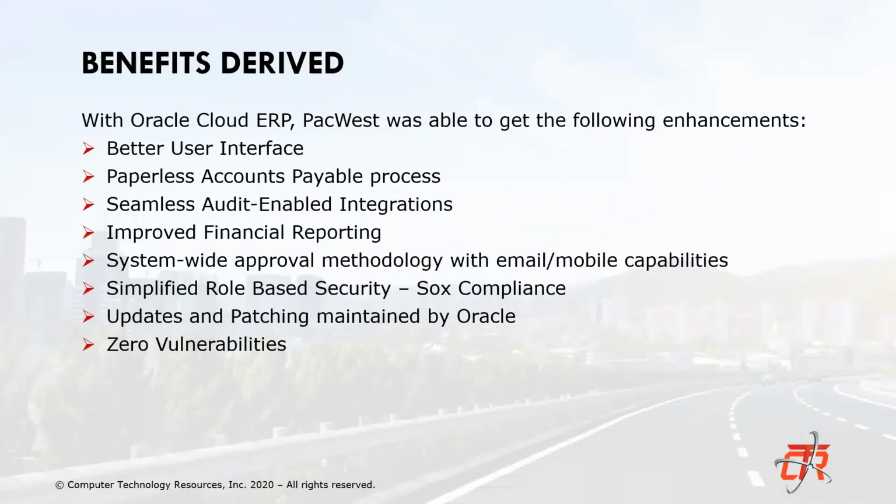It's like we know every quarter, we know what we have to test. We get the changes that Oracle sends over, some enhancements and or modifications. We read those before we do the patching. We test for 2 weeks. So we have it now. We have it down pat. I mean, it's really nice. Those are a few things.